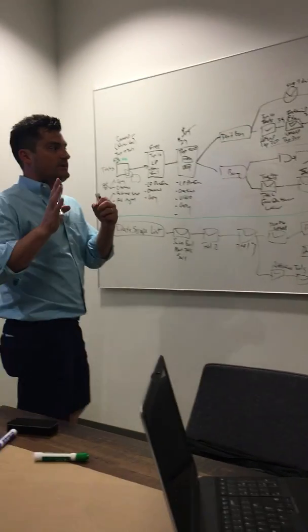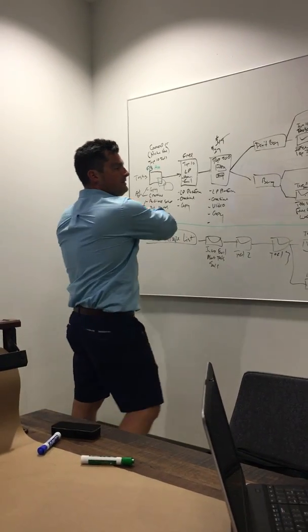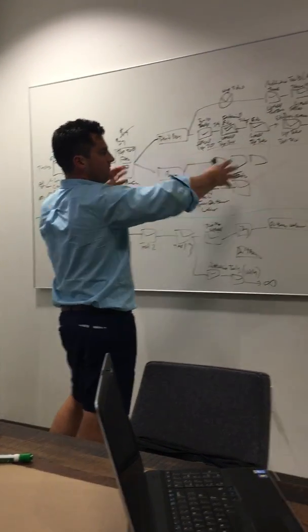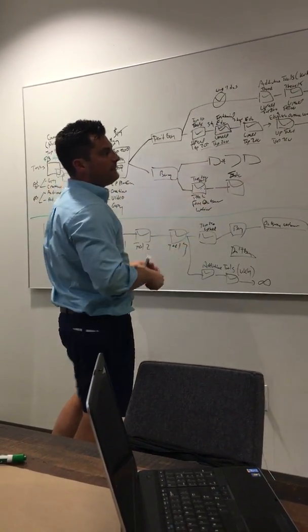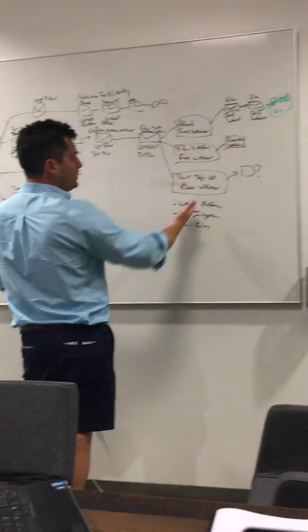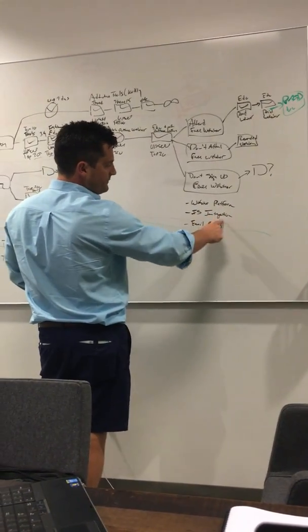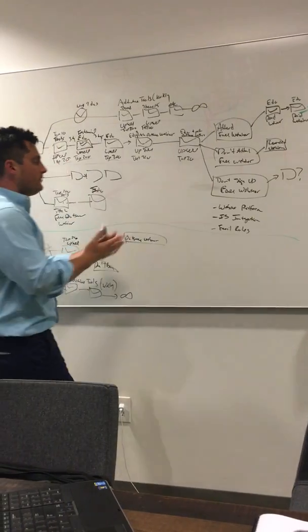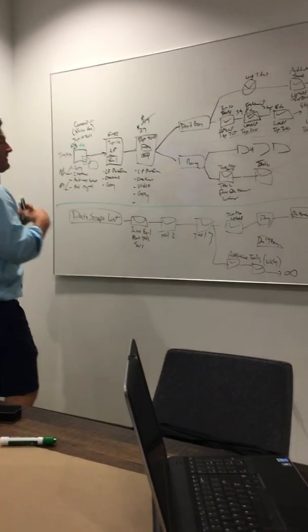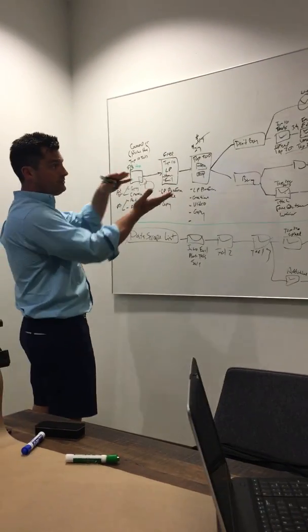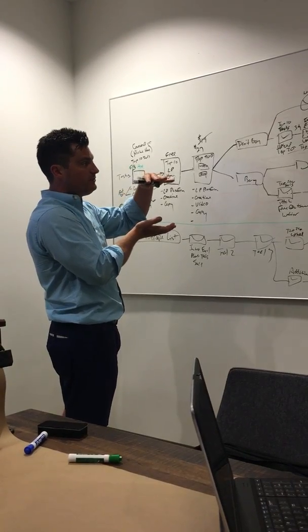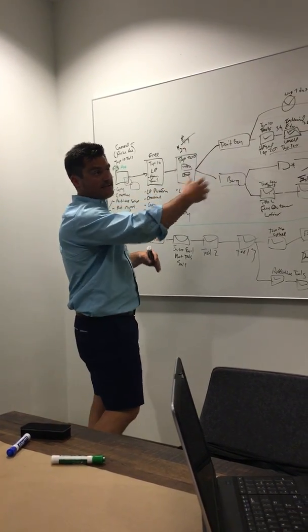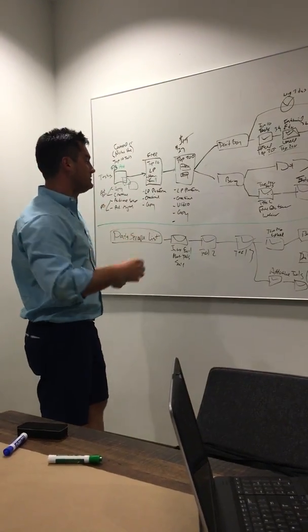So what I'm looking for is kind of a flow chart that captures not only the different outcomes in the decision tree, but what's needed. Like here, we need the webinar platform, we need Infusionsoft integration, we need the email rules, build that out. And I think you can capture both. Capture the journey, but also capture what needs to happen under each one of them. And then we translate this into Active Collab and create a Gantt chart of milestones.